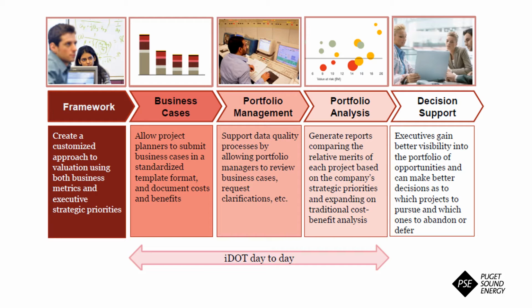This tool allows the planning team to collect project details in a standard format, convert project benefits, costs, and risks into a net present value, and create a project portfolio that maximizes benefits for a given budget.